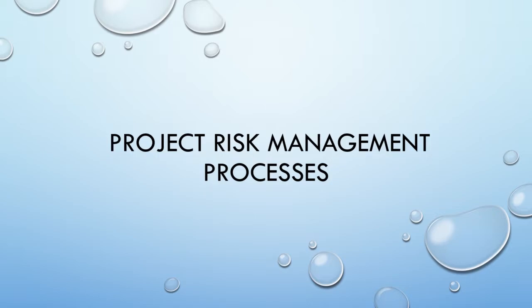So how can we manage the risk? To begin managing the risk, it is crucial to start with a clear and precise definition of what your project has been tasked to deliver. In other words, write a very detailed project charter with your project vision, objectives, scope, and deliverables. This way, risk can be identified at every stage of the project.